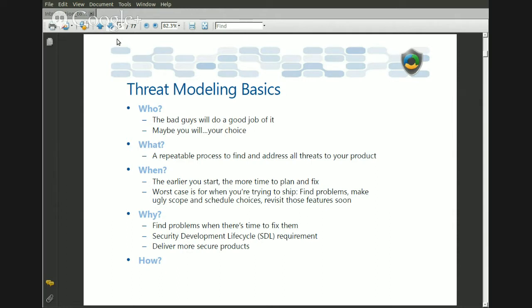If you know that you have poor quality in your software up front, then you should fix it up front. Do not wait until the last minute to fix something that is bad. Address that item as fast as you can. That's why risk management is important as well. When you do your threat modeling, you may find other associated risks. You may say, we have this technical risk that we didn't think about before, so we need to address it now. You get that item captured as a risk and start tracking it immediately.